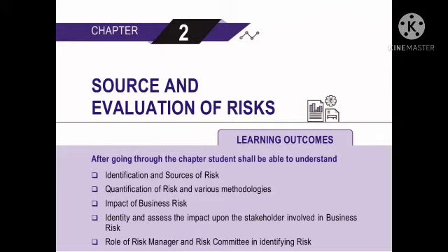This keeps the focus on understanding the relationships between the causes, event, and consequences. After a brainstorming session, bow tie analysis is a great way to clean up the ideas generated and consolidate the results into more appropriate risk statements.